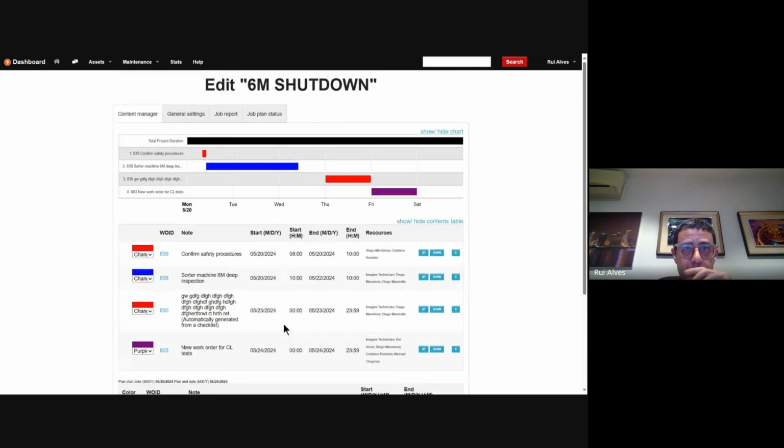So in practical terms, from our experience here, what you have planned is not exactly what's going to happen, for several reasons. So what we recommend is that regularly, probably at the end of each day of work, you would come here and adjust this to what actually happened if it's already in the past, and replan the things that are coming in the near future. So you will keep planning as you go, keep adjusting as you go.